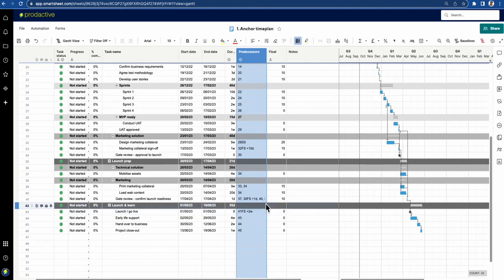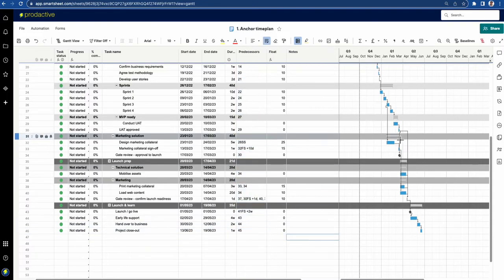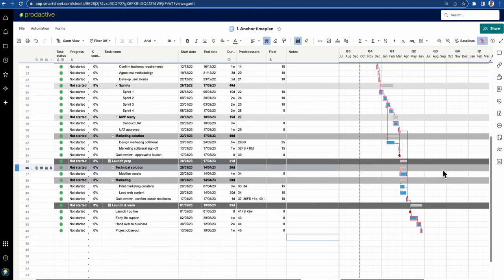Let's start with the first thing: the critical path. If you go to the top right-hand corner, you can see this little red button with three rows — 'show the critical path.' Pretty simple. So let's turn it on, and that's a fabulous tool to help you see what the critical path is for your project.